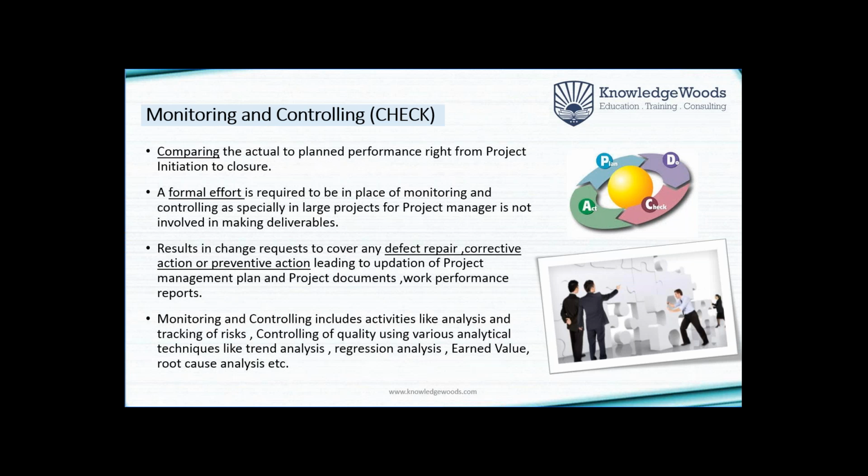Now while executing, you will have to, as per the project management good practices, continuously monitor and control. So the first part is monitor. When will you monitor? That is mentioned in the project management plan. Will you monitor it week by week, fortnightly, monthly, quarterly? Or you may monitor it as per the completion of a deliverable. So once a deliverable is completed, you may monitor it. The way it is mentioned in the project management plan, you monitor it.